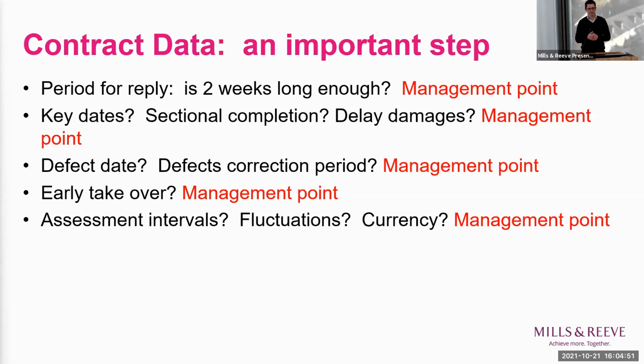And the defect correction period, is it a 24-hour period for urgent things or slightly longer for more routine defects? These are for you to introduce into the NEC form. They don't help you along in terms of that. And as a contractor, you'll be very keen to ensure that the assessment intervals are correct for you, whether it's a 30-day period or if it's a quick fit-out contract, it might be that you're moving to a fortnight period for that type of contract.